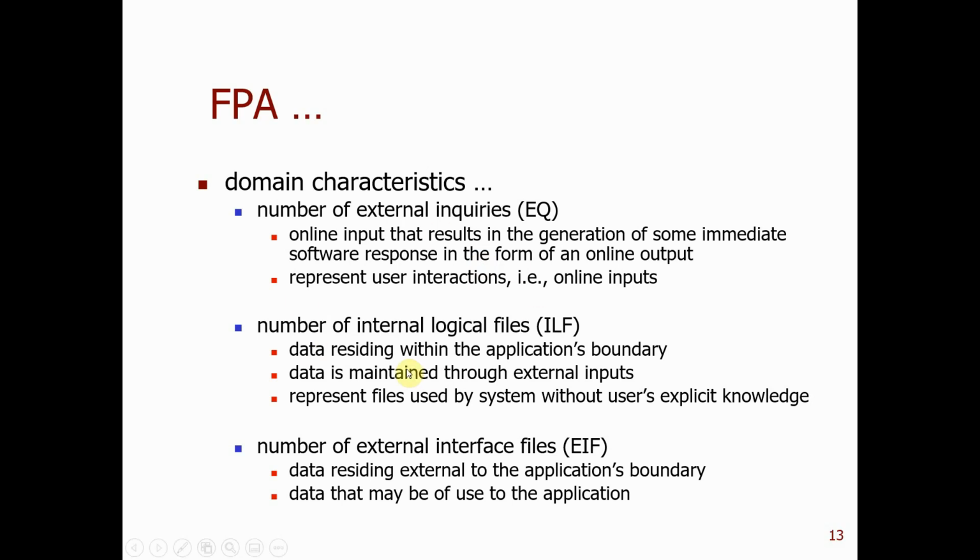An internal logical file is the data within the application, and the external interface file is the data outside the domain of the application. The internal files include the database or intermediate files, temp files, and the external file is something outside.